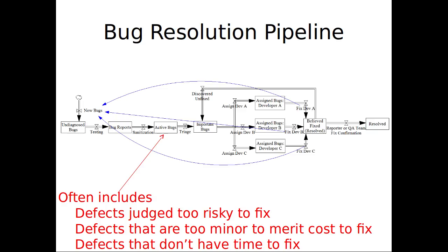Why not? Yeah. If it's a minor bug and it requires a major restructuring of the system. Good. Yeah. So the cost benefit is not worth it. Yeah. It's a feature you might be getting rid of or something. Great idea, actually. I hadn't had that in mind, but that's exactly right. This is something that's on its way out anyway. That part of the code base is going to be tossed. It's just not worth it for us.